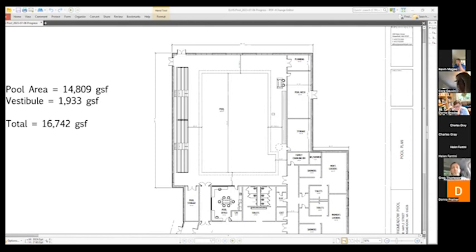And to go a step further, because time is of the essence here, if there's no fixture count difference, if we look at the difference here and work in, what I'm hearing is that the smaller apron is acceptable, the 8.5 on one side, right? And we work that in, and we find out that the difference of that larger pool isn't going to be a massive fixture count change, then we would have some information to kind of go on to produce what Aviva was suggesting, is information to allow the cost estimator to give it to you as an alternate.